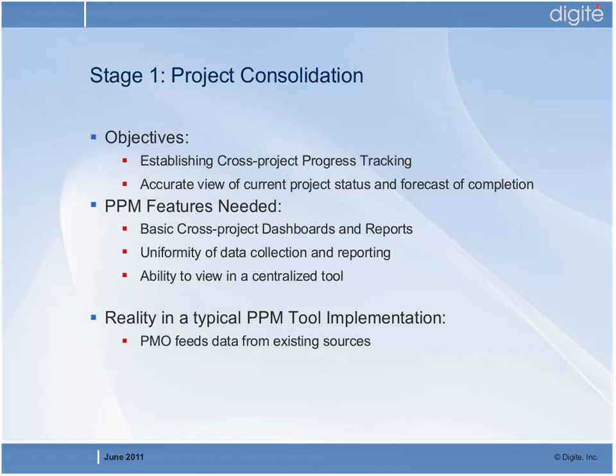One is able to define cross project dashboards and reports, and based on that get into a uniform method of data collection and reporting, looking at it from a centralized organizational perspective. What in reality happens is that because the focus is purely on cross project dashboards, the PMO, which is typically involved in driving these efforts, continues to feed data from existing sources, whether from spreadsheets, individual PPM or project management tools, Microsoft Project on people's desktops, or a variety of homegrown tools. The PMO continues to feed the data from existing sources.